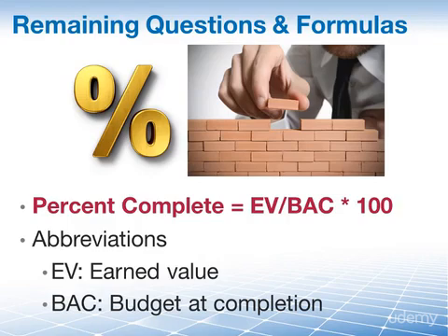If you had 550 kilometers to cover the full journey, but so far you have only driven 300 kilometers, then at that point you are only 300 divided by 550, or about 55% complete.